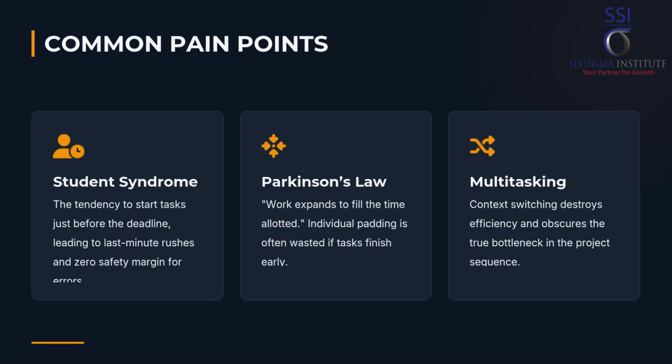Individual task performers add personal safety buffers, estimates, to their task durations to account for uncertainty, fear of failure, or resource contention. This leads to Parkinson's law: work expands to fill the time allotted for its completion. The project duration inflates unnecessarily.